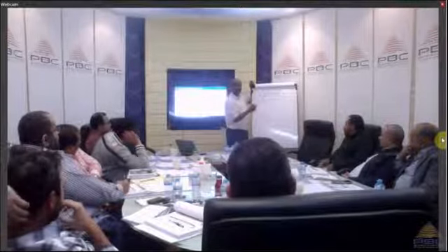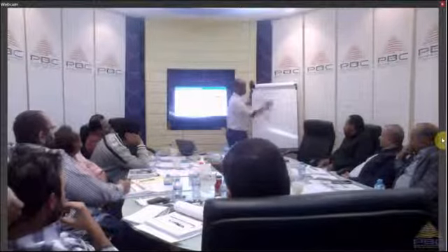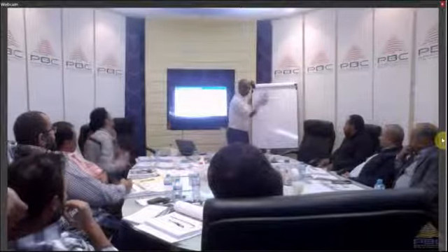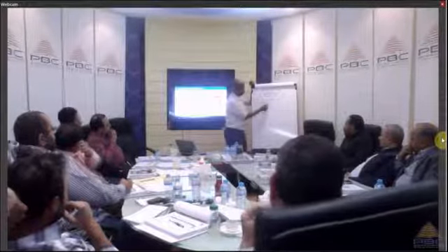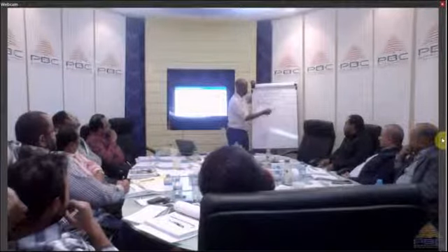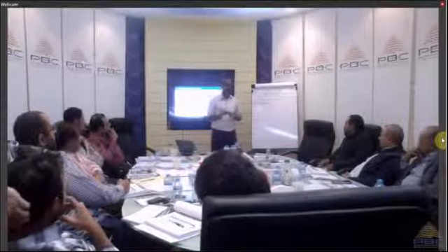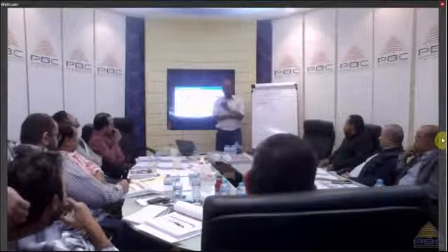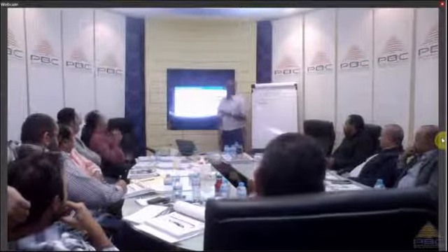So if I am a project manager in charge of building a hospital in London, I log into the website and I choose hospital from a drop-down menu. There are hospitals, schools, roads, whatever. They ask me for certain details about the hospital, maybe the area, a couple of key questions, and then they give me a list of resources needed to build that hospital in that duration. This is called published estimating data.